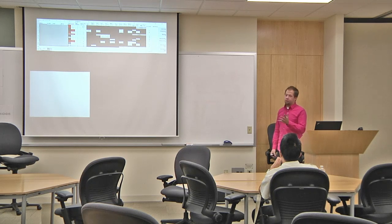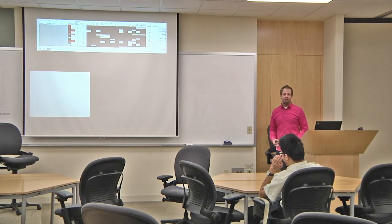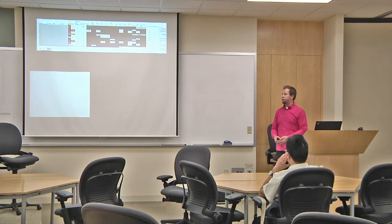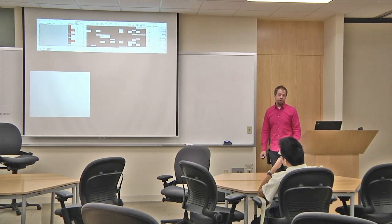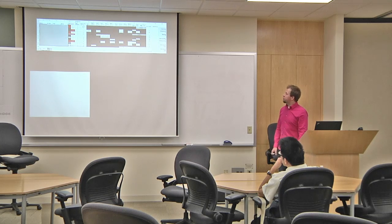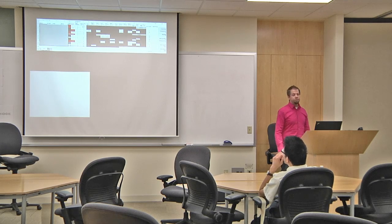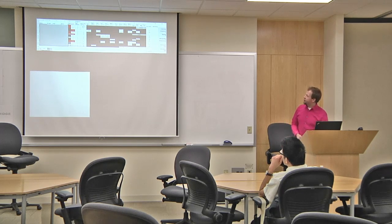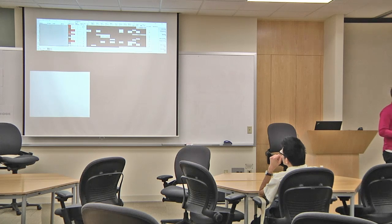But for me, I just want basically a dashboard, because I'm almost like a stupid business manager at this point. I don't want to understand what's going on in the internals. I just want the quick view. So all those black things are like, did a student submit a progress report that week? And you can see that it's mostly black, and there's almost none of them that have 2 weeks in a row that don't have one. So they might have disappeared for a week, but then they got back on track the next week. And in fact, I'd have all kinds of fancy conditional highlighting that says, if they're behind by 1 or 2 reports, suddenly the whole thing flashes red.